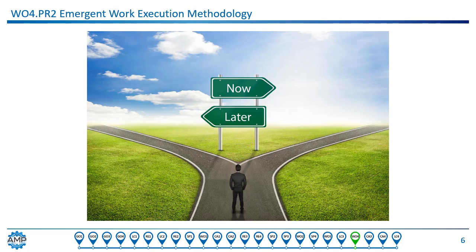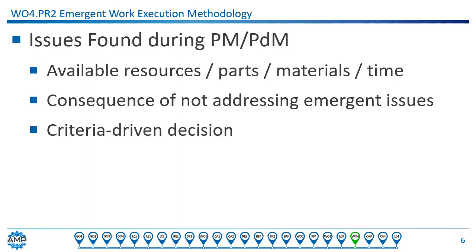Without some specific criteria, this is not a good idea. You might need to go search out parts, perform some extra support work like insulation removal or something like that, and guess how much longer the repair would take relative to the schedule requirements, and then evaluate any work that won't get done as a result of dedicating resources to unanticipated repairs. The bottom line is that some proactive tasks anticipate finding a failure mode in progress, and they identify allowable repairs that can be made on the spot.